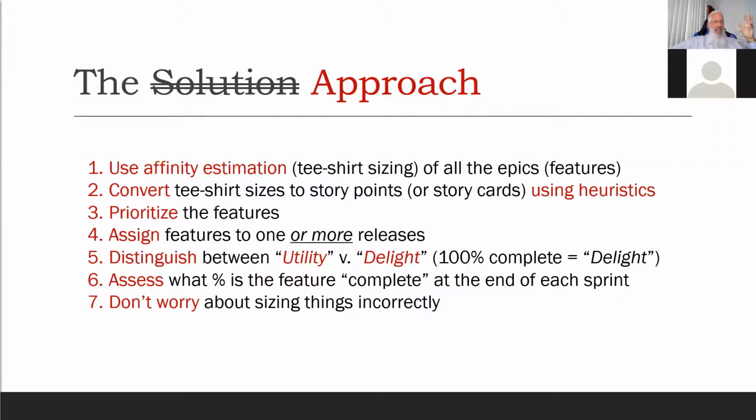Don't worry about sizing things incorrectly. Don't get hung up if a t-shirt size is small, and then when the team is working on the small t-shirt size, they find out it's more complex, and they're like, it's not really a small t-shirt size. This is more like a medium or a large. I don't worry about things like that. We went with what we knew when we initially sized it. I don't change the t-shirt size on work efforts that we are currently working on.